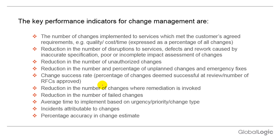Change success rate: percentage of changes deemed successful at review, and number of RFCs approved. We must ensure a successful change management rate for all approved RFCs. Reduction in the number of changes where remediation is invoked, reduction in failed changes, average time to implement based on urgency, priority, and change type, incidents attributed to change, and percentage accuracy of change estimates. These KPIs are very important for effective change management process implementation.